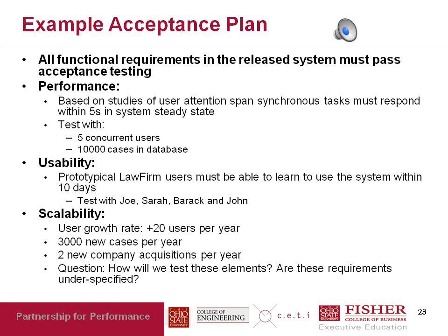All of those different things. So the quantification that I talked about that needs to take place from the non-functional requirements, a further quantification has to take place for the acceptance plan, because a deterministic test has to result from this process that the user or the customer can explicitly do, and the passing or failure of that test should be clear, and that constitutes the passing or failing of the acceptance plan.